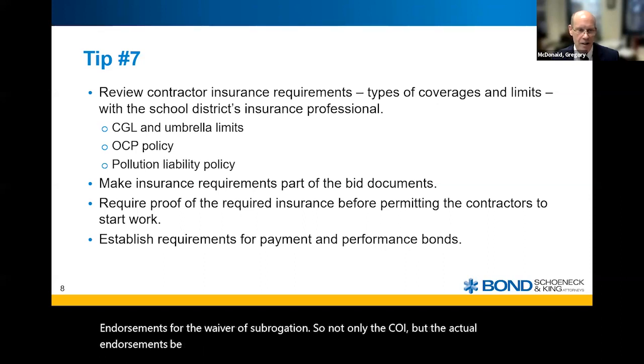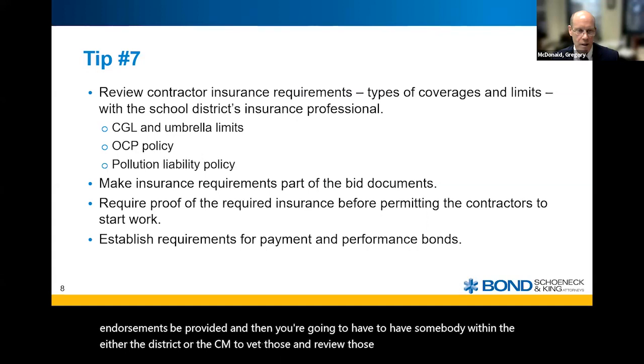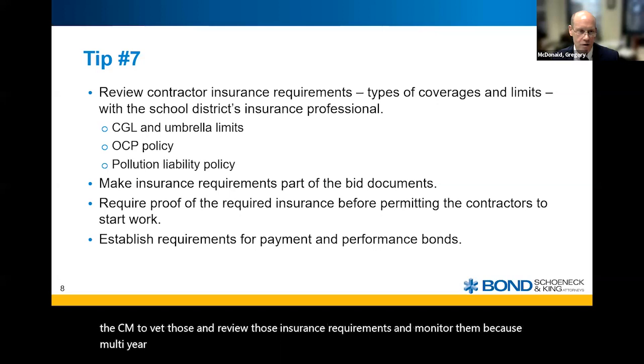And then you're going to have somebody within either the district or the CM to vet those and review those insurance requirements and monitor them, because in multi-year projects, the insurance is going to lapse and have to be renewed, and you want to make sure that they have the same insurance throughout the project.